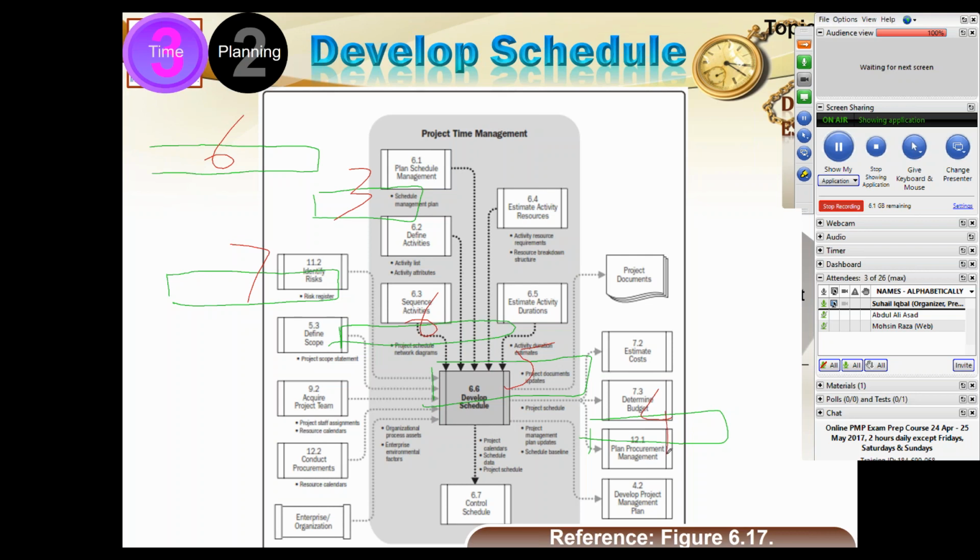So you see, this is probably my critical path. So my critical path is 6 plus 3, 9 plus 5, 14 plus 4, for 18 days is my critical path.